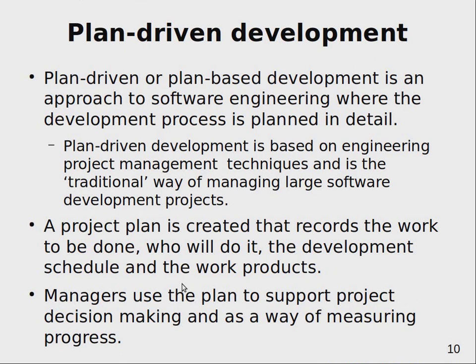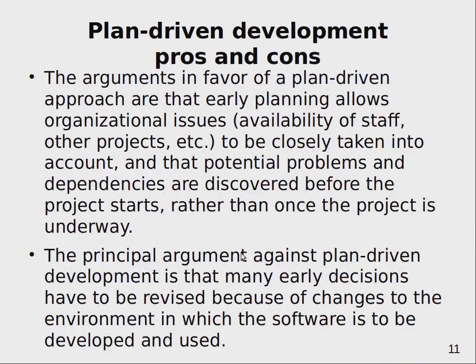Like you developed something concurrently in very many streams, but when you start merging things, when you have high-level testing and deployment, you can't parallelize it very much, so this means you can't use many employees working in parallel at this stage, and that's one of the reasons why end phases of projects are usually delayed, because the assumption was that everything will happen concurrently and with the same speed as somewhere in the middle of the project.